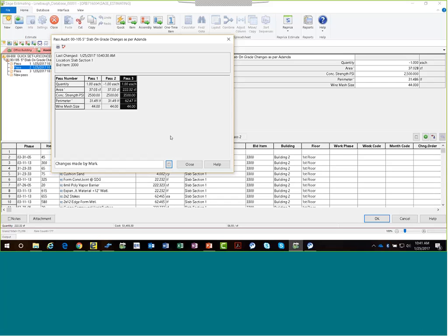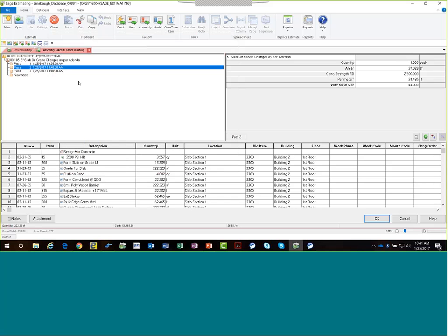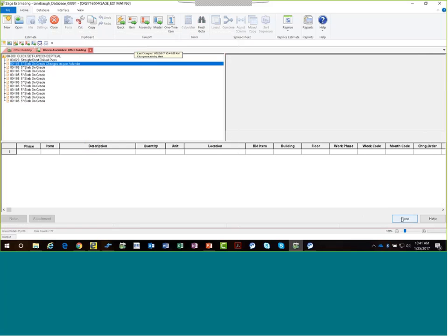And that's so important when I'm reviewing a project, especially when changes happen, and I need to go back and review and say, well, hold on a minute, what's going on here? Now, one thing you could do is transfer the whole thing over to another estimate after you make changes, which is just create a new estimate and do a bridge between the existing estimate and the new one and do an auto, and it would do that. Then you have the ability to compare estimate 1 to estimate 2 within Sage, which is one of the things we can do there. So just in review, I can go and review any of the other ones that we've done.